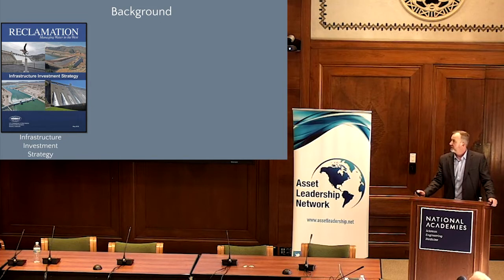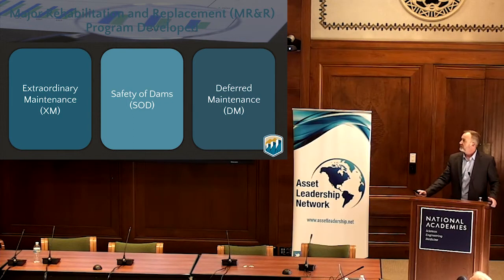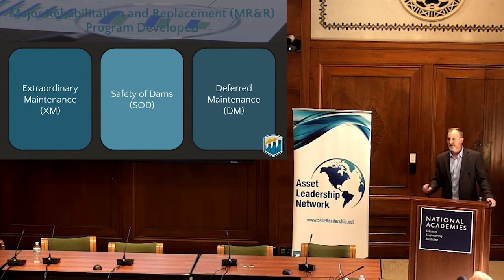So in this infrastructure investment strategy, we really want to document our repair needs, going out as far as we possibly could. And we developed this program called MR&R, or Major Rehabilitation and Replacement. And that included 3 different buckets of activities we were undertaking. The first is extraordinary maintenance. These are big capital improvement projects. And we set a threshold of $100,000. So we wanted to capture the bigger projects, not the smaller ones.